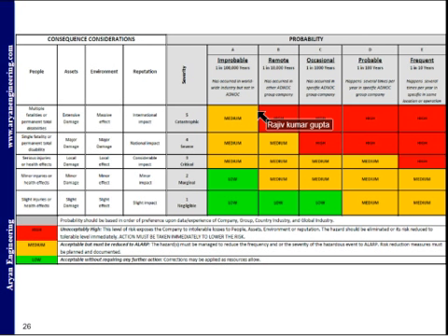So in the red color, that is the high risk, and then medium and low risk. And I said there is a risk threshold that varies from company to company. In my organization where I am working, this red color high risk is not acceptable. So our threshold is like this.